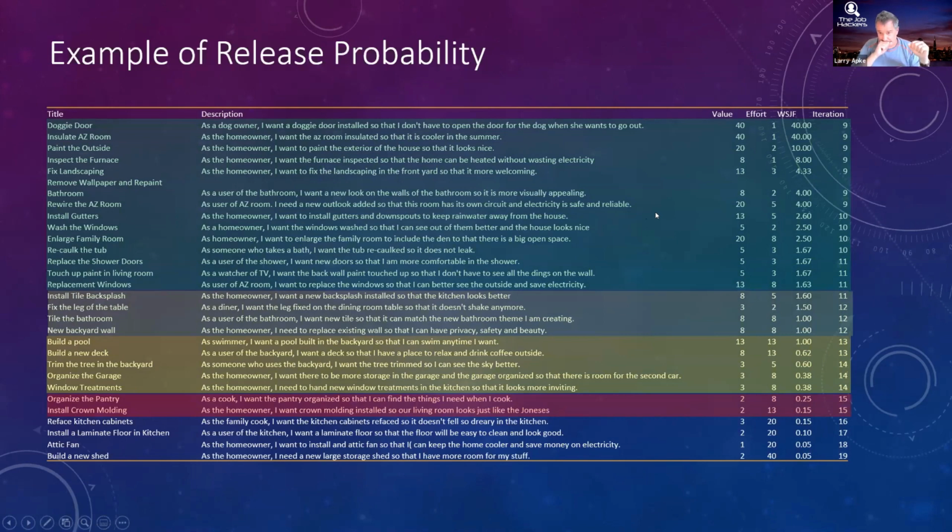Here's another fun thing. Once I have an average and a standard deviation, or I think it's not called an average, but that's nomenclature, I think it's a mean. Once I have the mean and the standard deviation, then I can start to predict the future because I'm assuming it's a somewhat normalized bell-shaped curve where I have so many standard deviations from the mean, I have a certain percentage of data that will fall into that data point. So I can say, if you want to know what's going to happen over the next quarter, good. I'll give you probability because that's really what it is in the complex world. It's probability of delivery. It's not absolute.